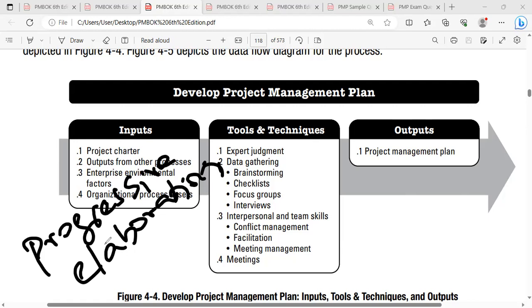That should be a formal approval. He has to document what changes he has to make. He has to get the approval. Then once it is approved, he has to do the changes. Is it clear or not, guys?